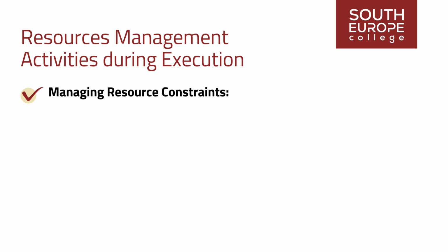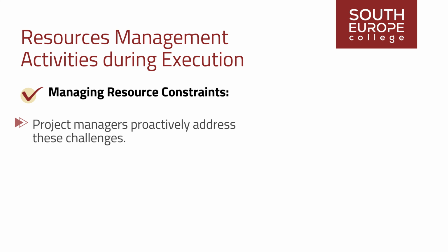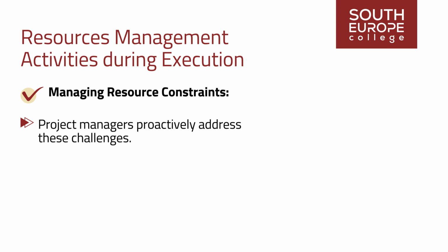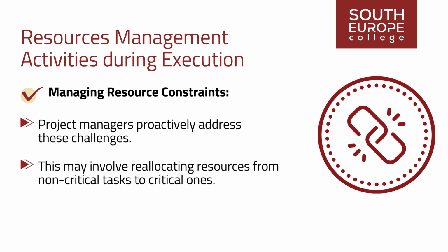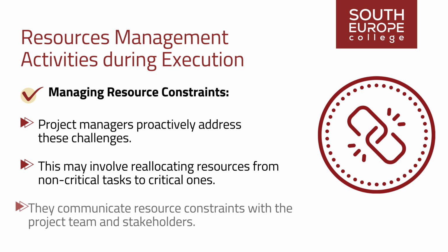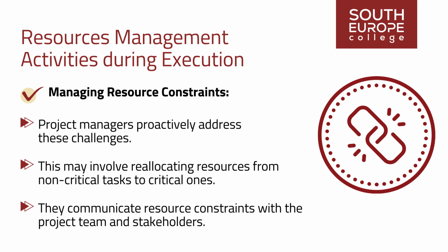Managing resource constraints. In resource constraints or shortages, project managers proactively address these challenges. This may involve reallocating resources from non-critical tasks to critical ones, renegotiating project schedules, or seeking approval for additional resources from stakeholders. They communicate resource constraints effectively with the project team and stakeholders, ensuring that everyone is aware of the impact on project execution and any necessary adjustments that need to be made.